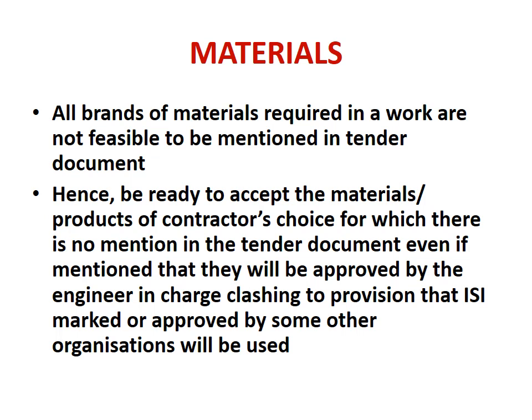But there may be some provision in the contract document that ISI marks, suppose, or approval by some other organization, or ASTM, or some other provision may be there, which may clash. If they have financial implications, then the contractor will bring all ISI marked material, and he will say that from ISI marked materials only, the engineer in charge or project manager should approve the materials. So project managers should be ready to accept the materials or products as per the contractor's choice, because this is really binding to the contract.